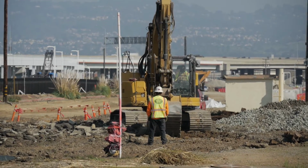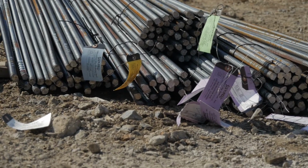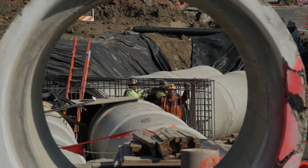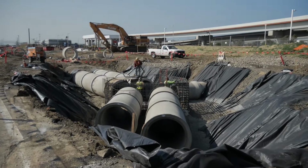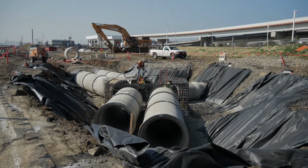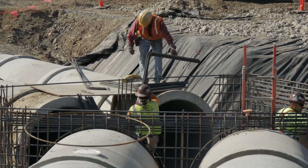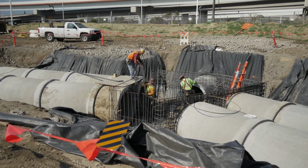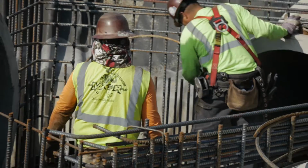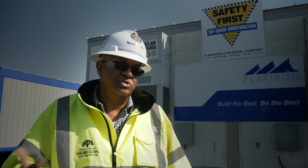It starts with each subcontractor submitting their safety submittals, just as they do on the means and methods side. I review that. The key document that they submit is what we call a job hazard analysis. What that is defines, based upon the scope of work that every trade contractor would perform, their task, the likely hazards associated with those tasks, and how they would control them. So that provides the primary documentation and the primary process by which we evaluate and monitor the workplace safety program.